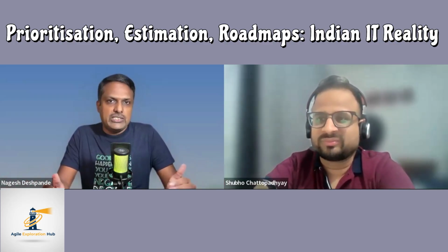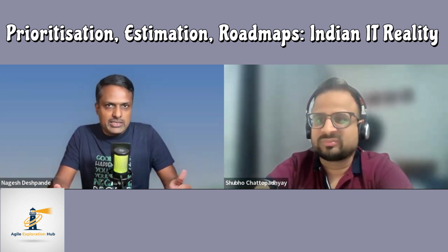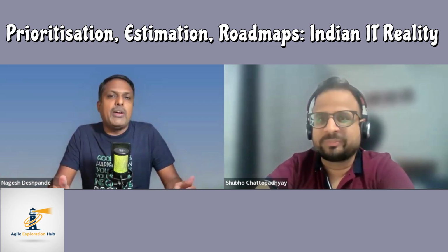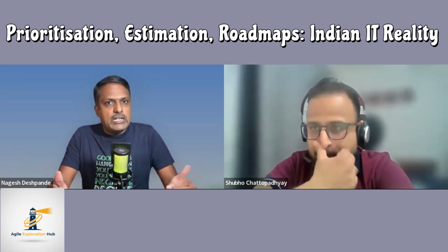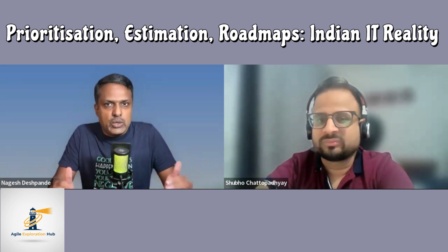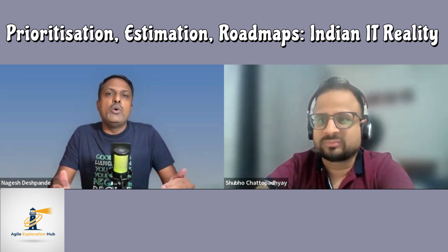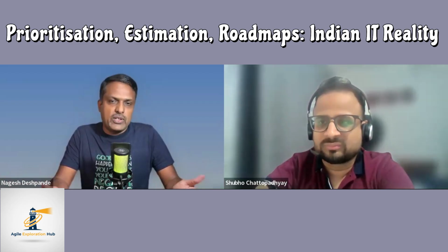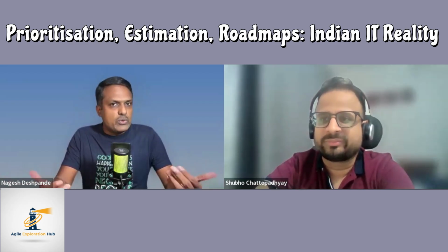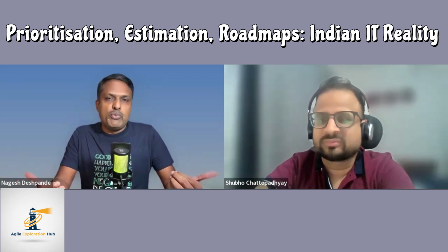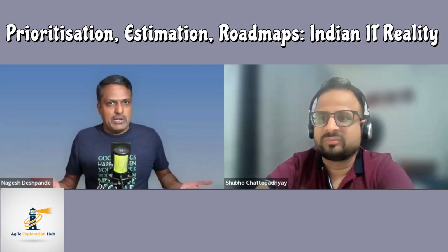You have to come to me and say, Nagesh, this is something which is going to break my system, this is something going to delay my deliveries, and I want this one at top. This can go into the next sprint or the sprint after, something like that. You have to talk in that language. If you put everything P1, it is not going to happen.